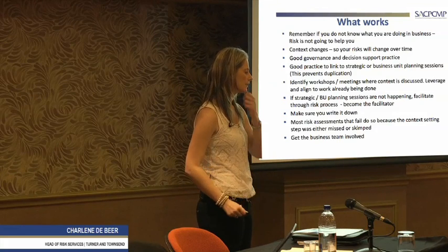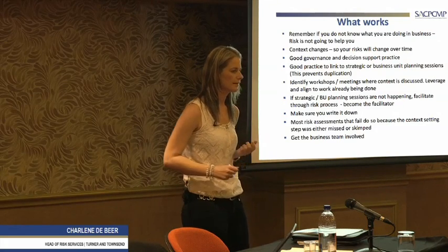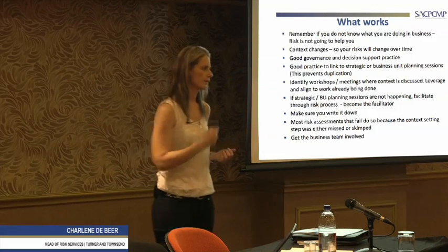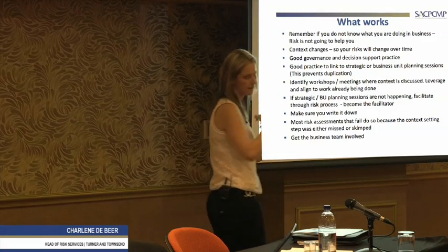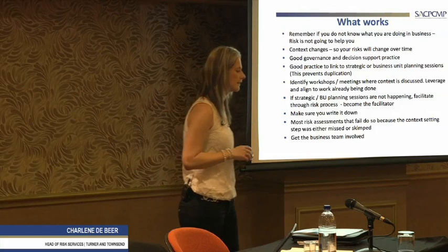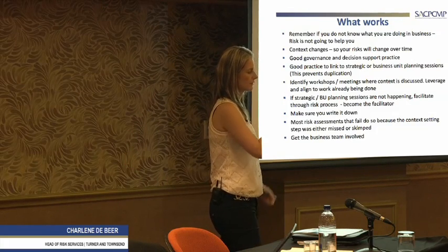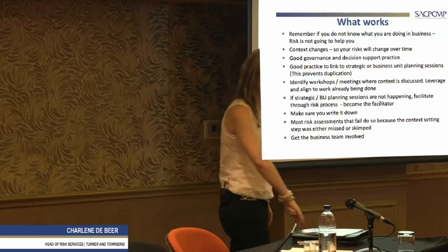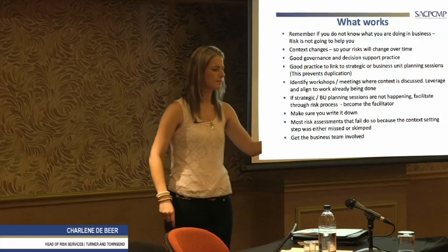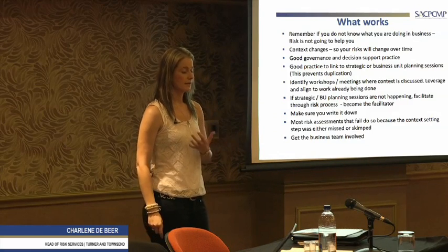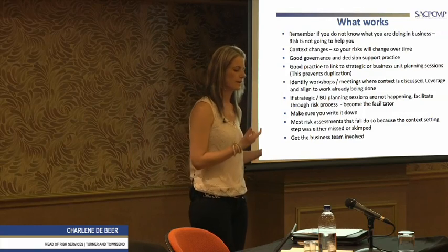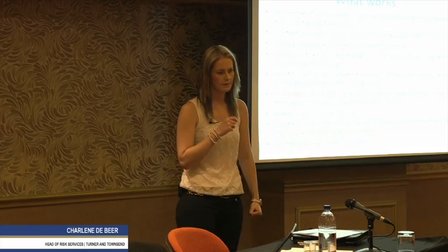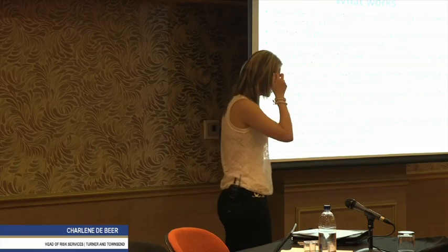And from a risk point of view, I sit a lot with the commercial guys as well. So if we run NEC contracts, on any early warning that we issue, or that we get issued, whether we're a contractor or client, doesn't matter, we should have a risk reduction meeting. We all know minutes of meetings mean nothing. Mediator arbitration says, I don't care, it's not contractual, just give me your contract. A risk reduction meeting in an NEC, if the contractor or the client promises to do something about this early warning that was raised, because it's in their camp, they need to do something about it. They bind it to clause 16.4, which means it becomes contractual then.